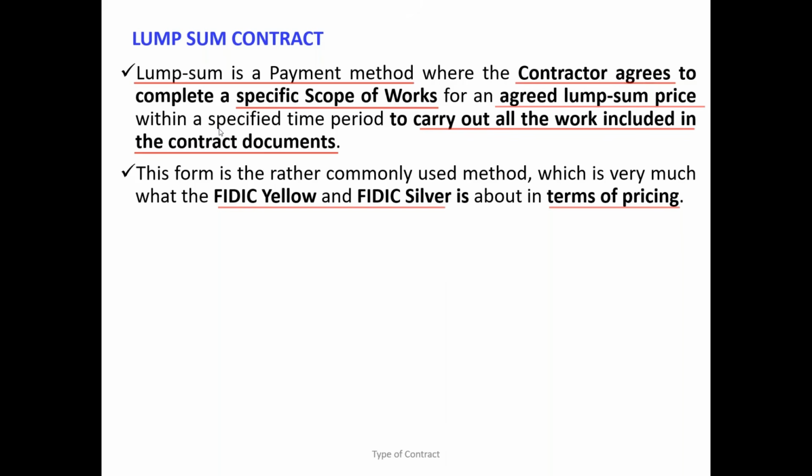Is that total sum a lump sum? Is it right? No, that total sum is not a lump sum. The total sum signed under the red book is an approximate sum. You cannot even say it is the contract sum. It is subject to change at the end.